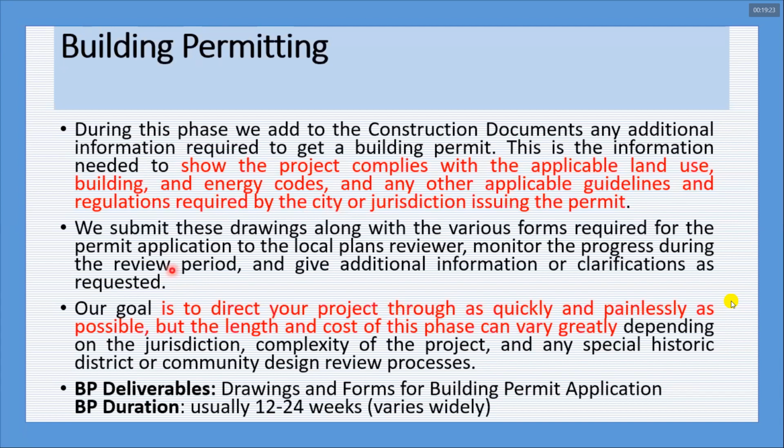Then sometimes your site is providing you with constraints. For example, there is a historic dome nearby your building, so within around 100 feet, you are not supposed to construct anything that will create vibration to the structure or affect its historical value. So every site has different constraints. So this is a lengthy process, around 12 to 24 weeks it is going to take.